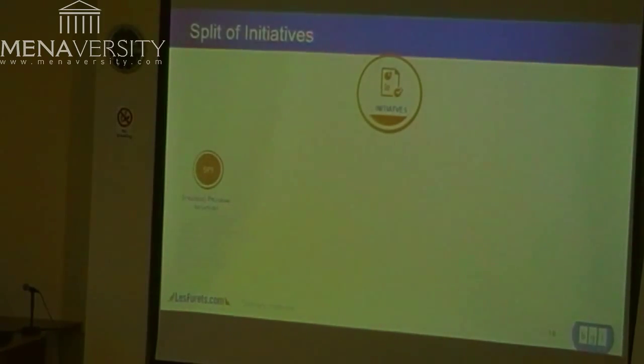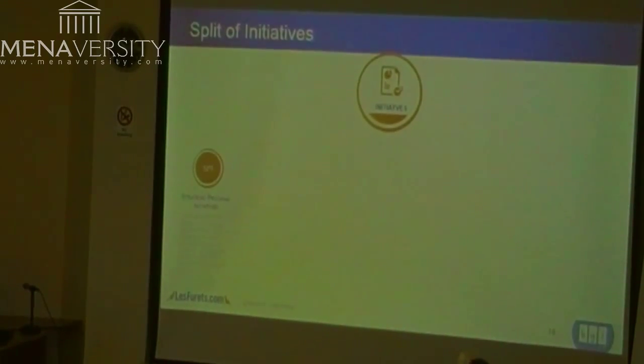It's followed up by the shareholder. They have dedicated meetings every two weeks to follow up on delivery, and it has the highest priority. And we have already done more thorough work on evaluating, but you will see later on that we always adopt a minimum viable product approach, even for a big project. We always say we're going to do the strict minimum possible first, launch it, and iterate upon it, instead of doing a six-month incubation and then ending up doing nothing.